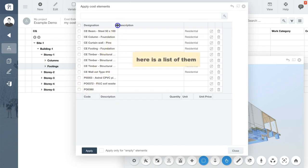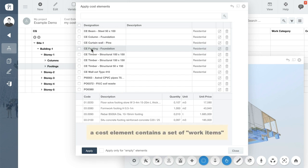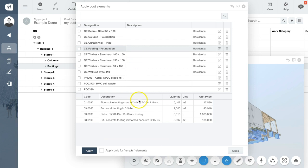Let me briefly explain what a cost element is, by taking the item Footing Foundation as an example. As you can see in the list below, the cost element for Footing Foundation is composed of a set of work items. Earth work, form work, and also steel and concrete.